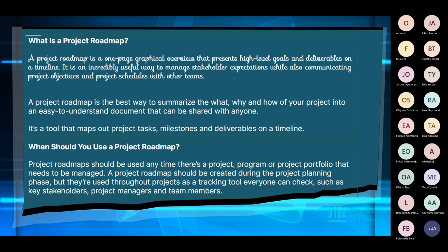Now, the terminology might bring to mind that, oh, okay, so a deliverable is a final output that you submit at the end of your project. No, not necessarily. Not necessarily the final output that you submit at the end of your project, but it actually refers to any project-related outputs that you submit during any of the phases of your project. So it could be that you're working on a project that you have monthly releases, for example. Do you get what I mean?